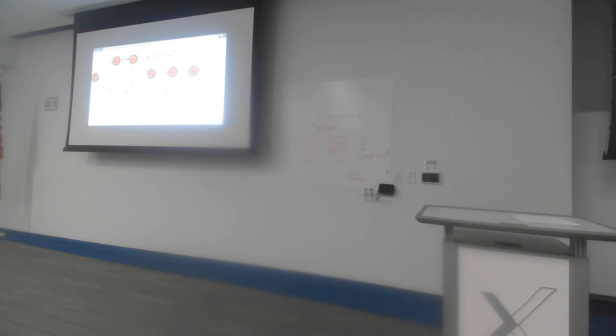has already been identified. Because if I start changing the different numbers by crashing different activities by different amounts of days, so for instance with activity G, activity I, activity J, if I start reducing those normal durations down by a day at a time, the whole path structure of the network diagram changes. And that means that every time I change numbers, it's possible that the critical path might change. I have to keep track of that.